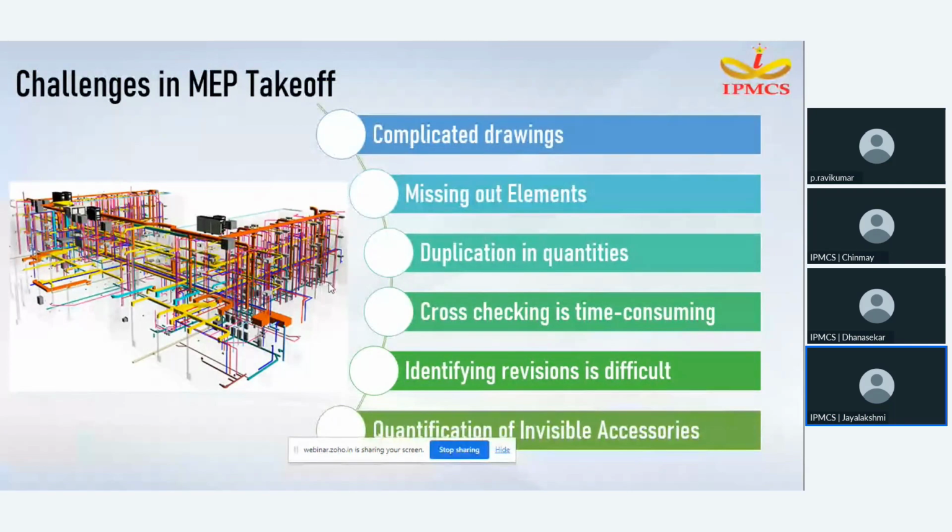So we were discussing the challenges in MEP takeoff. So yes, complicated drawings, missing out of elements, duplication in quantities, cross-checking is time consuming, identifying revisions is difficult, and quantification of invisible accessories.